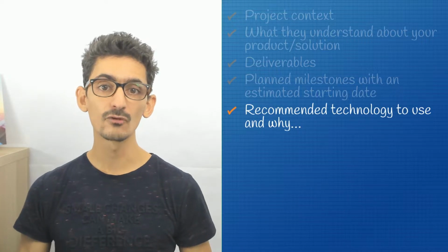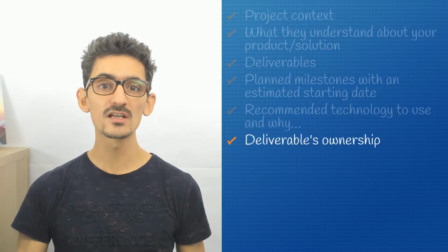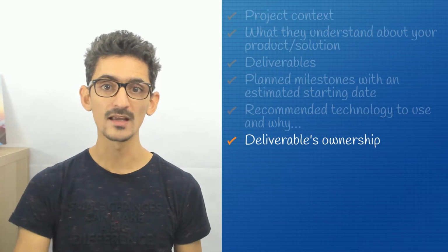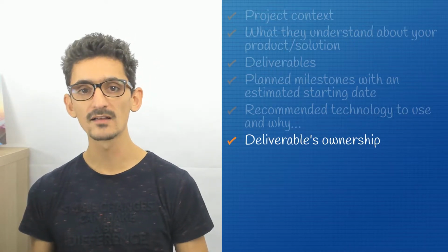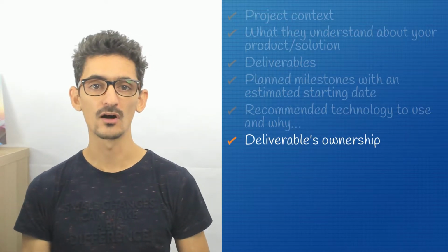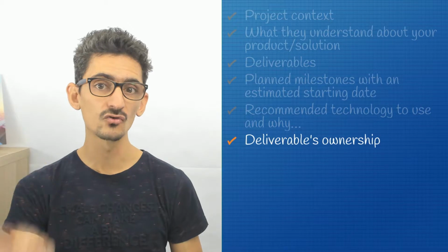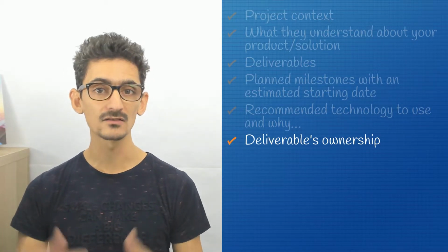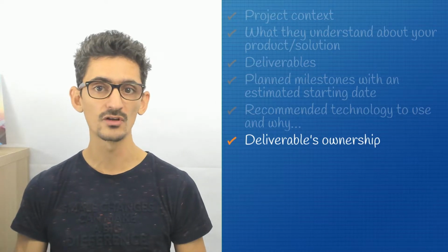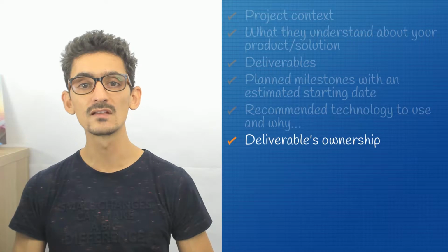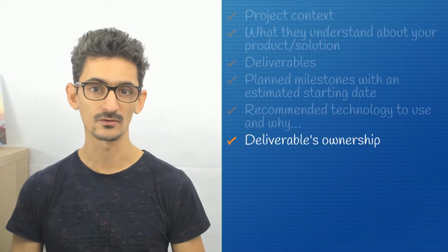Then you have the deliverables ownership. The ownership of the source code. I mean, who will be the owner of your application? Because some providers just provide a service-based solution and not the entire software. Or maybe they can provide you the solution, but you are not able or not allowed to internalize the development or to reuse the source code and to work on it on your own. So that's something that you need to discuss right from the bat with your providers.